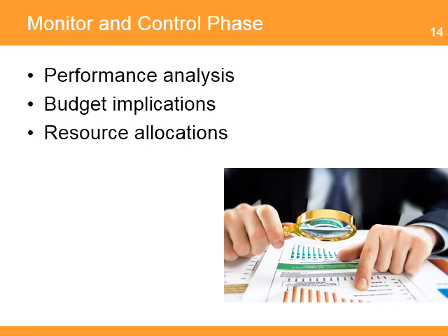For example, analysis of the monitoring data of the portfolio shows that some projects were late in achieving the performance targets. If this trend continues, there will be a need to extend the life of these projects, and that will have significant implications on the budget. In this type of situation, the portfolio manager, in consultation with key stakeholders, will develop a proposal to remedy the situation by either requesting additional funds or making changes in the portfolio's list of resource allocations.